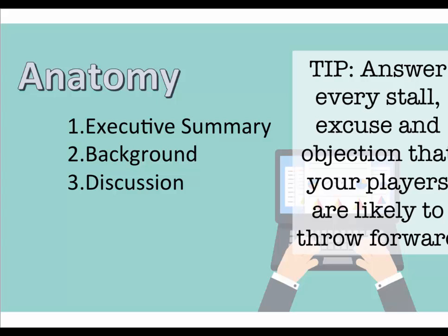Assumptions is something that you describe here. This is what you've assumed to be true. So you need to detail these. You've assumed that the hospital is still interested in delivering the maternity ward and not intending on closing it in 6 months. You've assumed that the patient numbers are going to stay the same. You've assumed that doctors who are currently working in the hospital will continue to work in the hospital.